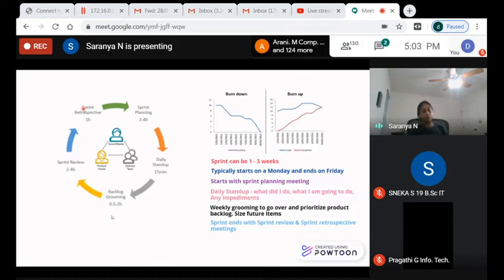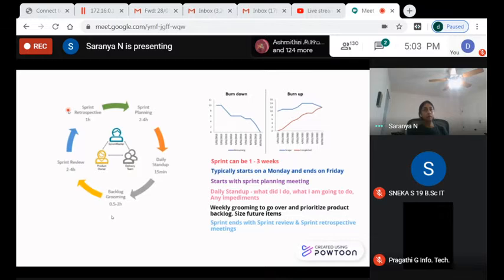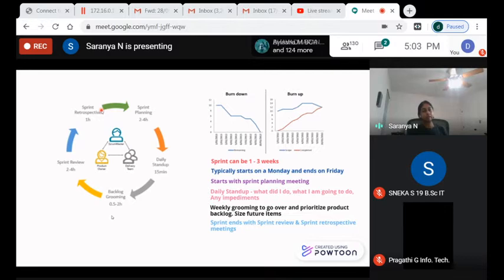Action items come out of the retrospective — for example, 'our standups are taking too much time, let's keep them to five minutes.' This is how we operate in the Scrum model.